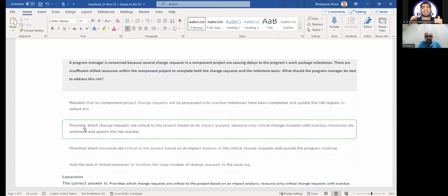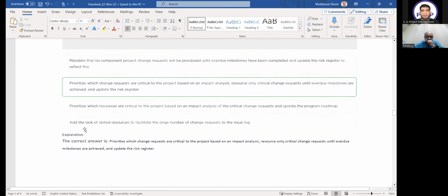You have identified there's a potential risk in that. Accordingly, the first step is to respond to the risk. Prioritize the risk, like we apply the Pareto rule, the 80-20 rule. Try to fix your milestones and try to deliver that. And only if it will not be able to deliver, then your roadmap will be updated. As long as your milestones are not slipped, you don't need to update the roadmap. Clear? Updating the roadmap is like you already made the decision that it has slipped. It's still a risk.